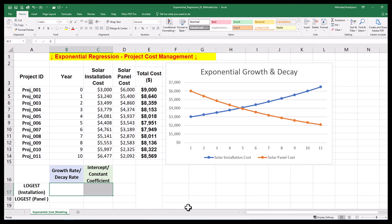Step two is using LOGIST function for exponential modeling. We can numerically calculate the growth or decay rate and also intercept of exponential curves using the LOGIST function in Excel, or logarithmic estimation.